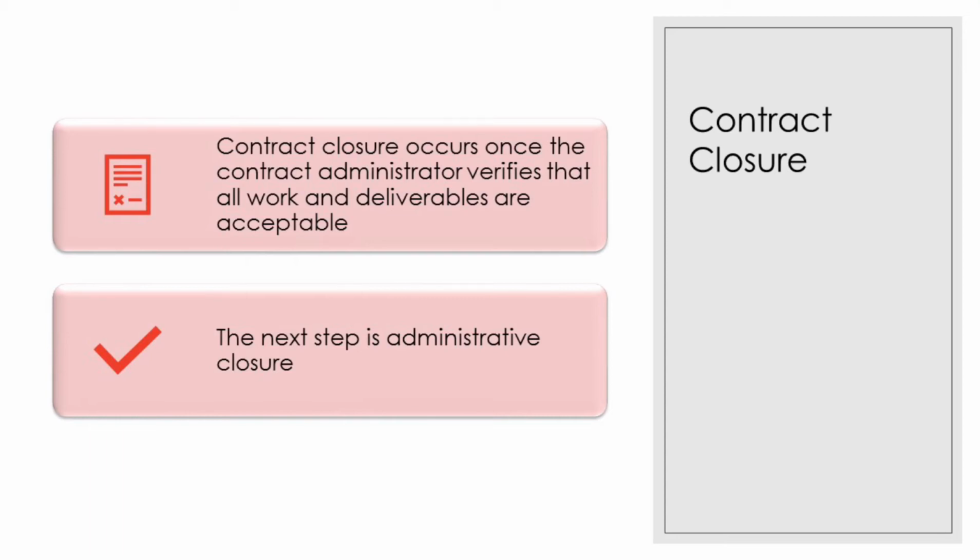And the contract is closed when it reaches the concluding phase, or when the contract is ended before the work is completed. In multi-phase projects, contract closure closes the appropriate contracts for the subsequent phases of the project. And we might repeat this process multiple times throughout the project. This might include any unsettled claims that might lead to a lawsuit or a court appeal.